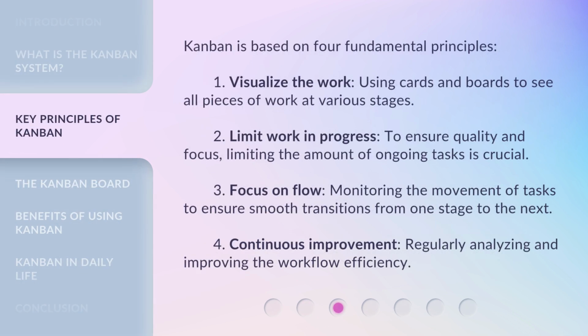Kanban is based on 4 fundamental principles. 1. Visualize the work, using cards and boards to see all pieces of work at various stages. 2. Limit work in progress. To ensure quality and focus, limiting the amount of ongoing tasks is crucial.